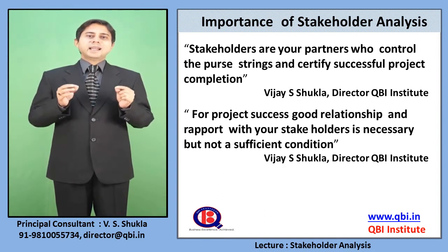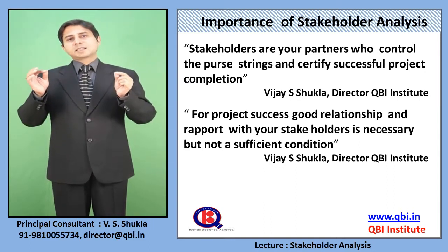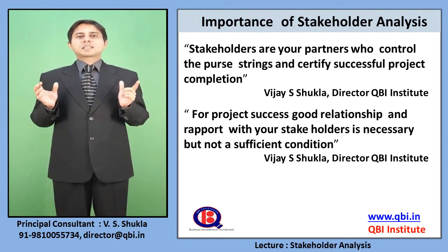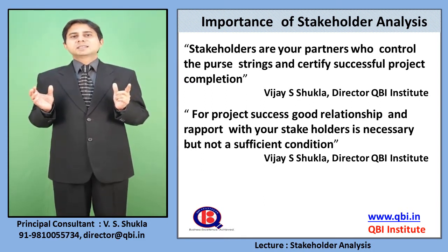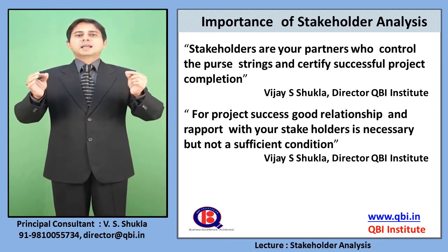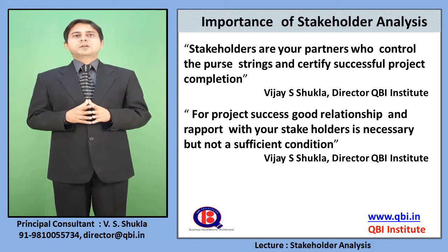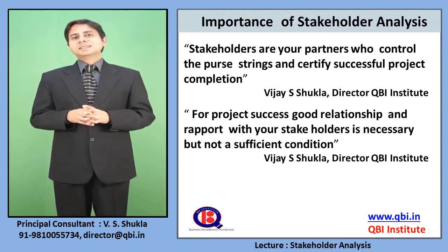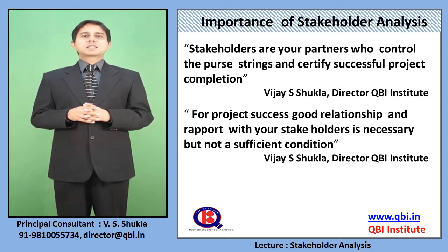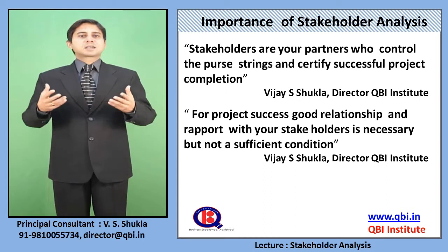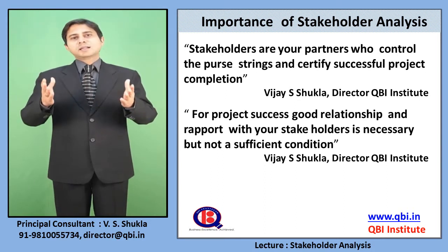So, their happiness and their satisfaction is important, and only when they are satisfied that project milestones are being reached, they will loosen their purse strings or they will make the payments as we have agreed upon. And they are also the ones who certify project completion. As a business analyst, you cannot say that look, the project has met all its objectives and the project is successful. No, it is the stakeholders, their satisfaction and their certification is must.